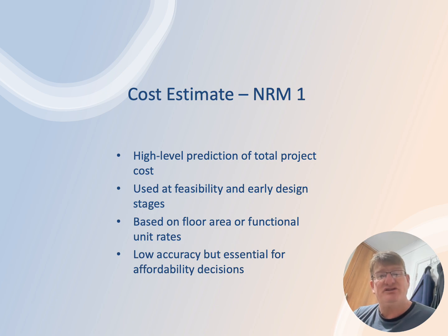And you'd have to justify to those stakeholders. So a cost estimate is a form of estimate. It's quantified through the gross internal floor area or the functional floor area, and it's then this structured methodology, and I say to you, go and have a look at the NRM1. It's a step-by-step process. Step 1, find this. Step 2, do this.